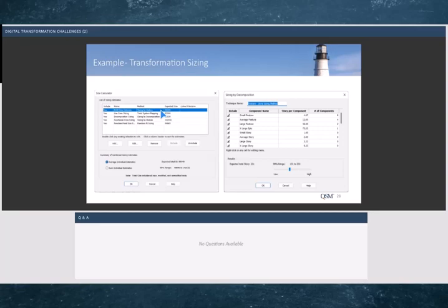You can use cases. We can break the system into different components, like decomposition sizing here. We might break it into number of reports or number of interfaces or number of components. We can use functional sizing by module. We can use function points. So we're very flexible in the way we approach the problem that we're trying to solve. And you have to be, because you're dealing with a lot of people in a transformation process, and usually people are hesitant to get the sizing right. Some people don't even want to do sizing. They want to say, well, it's 6 months big, or it's 10 people big. And that's okay too, but we really want to get a handle on scope if we can.